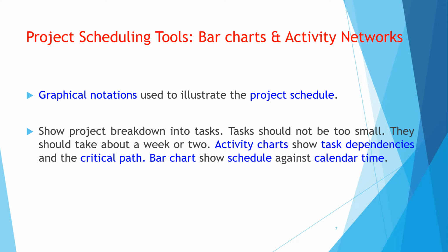Some of the project scheduling tools include the Gantt chart, a horizontal bar chart plotted over time, where each activity is shown as a bar. Schedule network analysis is a graphical display, from left to right across the page, of all logical interrelationships between elements of work in chronological order from initial planning through the project closure. As a project progresses, a regular analysis of this network diagram is a check to ensure the project is proceeding on track.